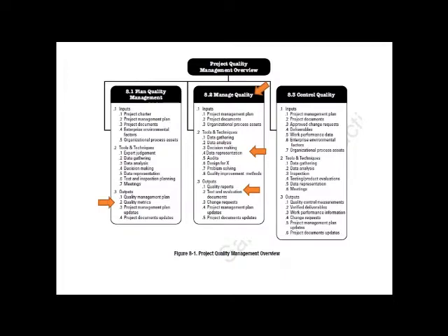I always say that managed quality is about before and during your development of the product of the project, whereas control quality is on the back end. You're getting the product, you're looking at it, you're inspecting it, you're measuring it, you're gathering data, and then you're making decisions based on whether you're meeting your parameters of quality or not.